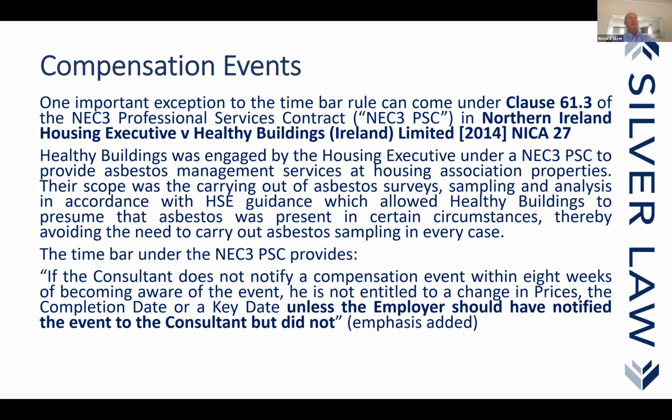And how can you foresee a delay for weather when the weather has actually occurred? The delay is today. Now, it may have impact in the future, a flood, or some major problem caused by rain, could have not only the delay today whilst we can't work, but it could cause damage that cause further delay in the future. But more often than not, the delay is today and tomorrow when the weather occurred. So you've then got X amount of weeks to submit your quotation. Well, it's happened now. But equally, we're looking at that the weather condition should be less than 1 in 10 years. Well, when are you going to find that out? If it's how much rain it's concerned, it's only when all the rain's occurred.